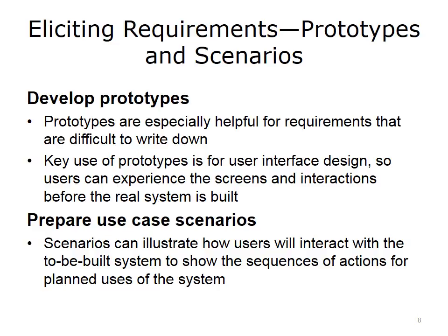Prototypes are widely used to show user interface screens. Essentially, what is behind the screen is stubbed out so the user can focus on the clarity and usefulness of the interfaces themselves. The prototype can be an effective way of establishing interfaces that are useful and seem to be valuable for users. Later on, what's behind these interfaces can be developed as part of the project.